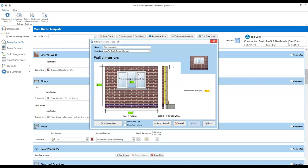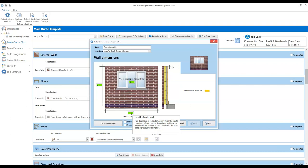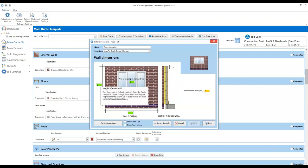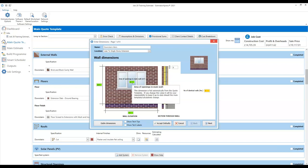In Estimator Express, when we talk about walls, we don't actually just mean walls — we mean everything from foundations through footings to the plastering, the decoration, the skirting of that wall. That's all done in one go because we can use the same set of dimensions to estimate all those things. You can see the dimensions here have been taken from that main quick template screen — we've got two side walls at three metres and a five metre wall, so the total length of wall for this extension is 11 metres. The wall height is taken from the ceiling height we typed into the main quick template.